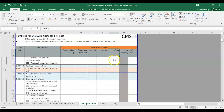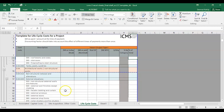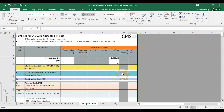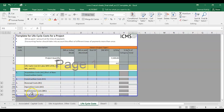You've got a quantity column, which I believe represents the gross internal floor area, then percentage cost per category and percentage of total life cycle costs. The percentage of each individual cost within a life cycle cost category, and the percentage of each row as a proportion of total life cycle costs. Life cycle costing, per ISO 15686-5, includes acquisition costs, construction costs, operations, maintenance, end of life, and subcategories within those.